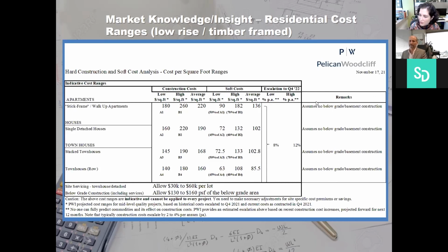Hi, Donny, what is the range of direct cost for a mid-rise, mid-level condo on an avenue? Timeline for construction. Can you answer that very quickly? Yeah, so very quickly, condos used to be in the 250s. I would say now that the blended rate, and that's assuming 30% is below grade and 70% is above grade, I would assume that you're now in the 3.25, 3.5, so 325 to 350 kind of range as a blended, and that you apply to the above grade square footage to get the total cost for the construction of below grade and above grade.